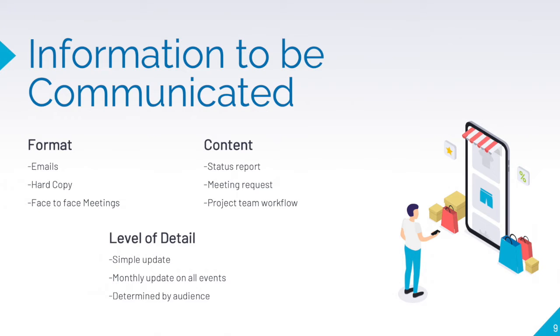Once requirements are established, the communication plan can start identifying how communication will be done. When communicating with the stakeholders, different formats will be identified. When sending different forms of communication, project teams will utilize emails, hard copies, meetings, or shared drives to help communicate. While the types of communication methods will be identified, this is also where the content and detail will be identified as well. Based on the type of communication method that is determined, will help determine the information to be communicated and the level of detail provided.